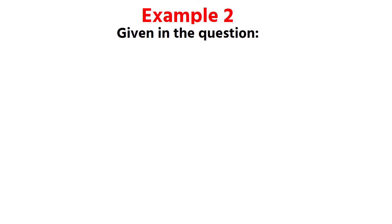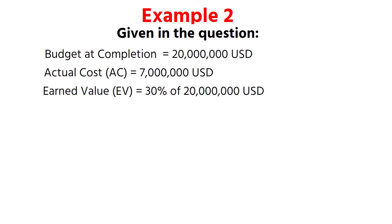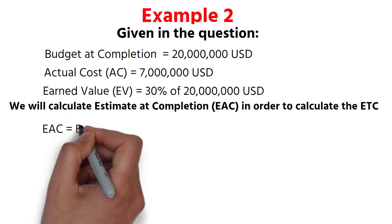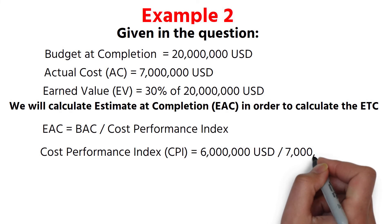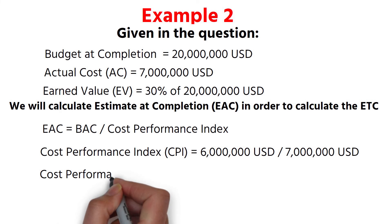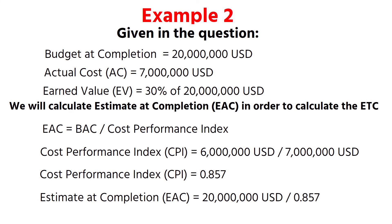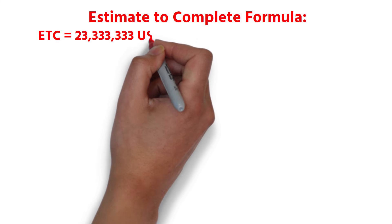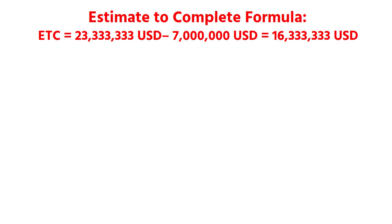Let's calculate the ETC for this project. Budget at completion equals 20 million US dollars. Actual cost equals 7 million US dollars. Earned value equals 30% of 20 million US dollars, which equals 6 million US dollars. We will calculate estimate at completion in order to calculate the ETC. EAC equals BAC divided by cost performance index. Cost performance index equals 6 million divided by 7 million, which equals 0.857. Estimate at completion equals 20 million divided by 0.857, which equals 23,333,333 US dollars. Estimate to complete equals 23,333,333 minus 7 million, which equals 16,333,333 US dollars.